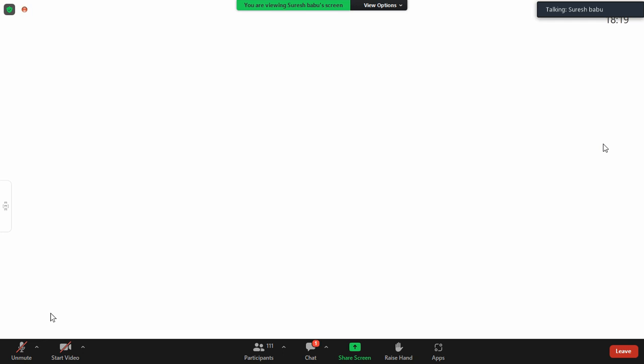To construct a big gated community with 40 floors of towers, 4 blocks, A block, B block, C block, D block, only by end of 2022 we complete tower 1. By end of 2023, we go for tower 2, tower 3, tower 4. For a bigger project only, you need multiple schedules. For a small project, one schedule is enough. Waterfall model and V model both belong to sequential models, best suitable for making small size of projects.